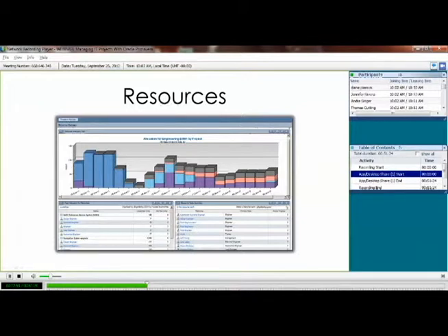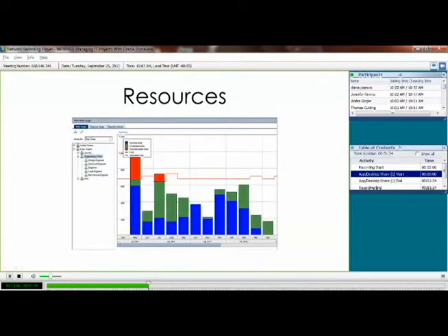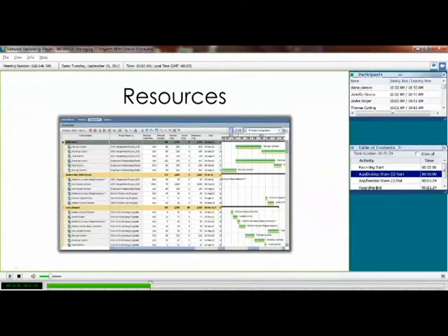They've got the ability to look at the demand of their resources, their open resources, and their team summary. On top of that, to collect resource data, they can look at it at a more individual level, where XYZ can take a look at which resources are over-allocated against their limit lines. Not only can they look at it from this view, from a histogram, but with P6, they can look at it in an individual view, where each resource is grouped right here with all the tasks assigned under them, and you can easily make corrections here to over-allocation and have visibility into all your resources' tasks.